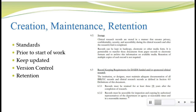Some templates simply provide a shell with common section headers; others include prompting text to remind you what needs to go in each section. First and foremost, study documents need to be in place prior to starting the work — you don't write the data entry instructions after you've entered all the patient data. Instead, you write them before you begin entry and then update them as you add new policies. At some point you're going to need to modify or update your study documents, and when that happens you'll need to implement some version control, ensuring every team member is using the current version of the document, not an old, outdated, or superseded one.